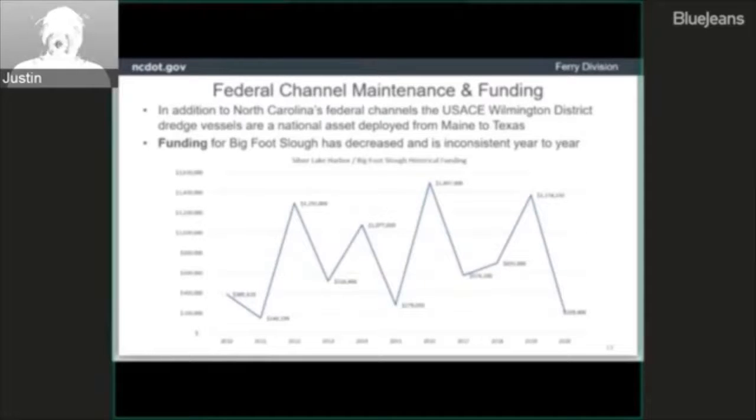So I don't have the estimate right in front of me, but it's just the amount of quantity in the dredge box. I mean, it's like a simple calculation on what the operator thinks the rate is, what the captain thinks the production rate is, and then you take the quantity, and then that amount of quantity at 2 depths.